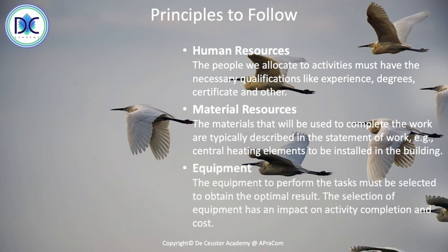The equipment, here we must also select the proper equipment because the equipment will be used to create the deliverables. The selection of the equipment has an effect on completion and cost. So when we have more sophisticated equipment, we will pay more. There may also be an effect that the work may be done faster. So we have to understand what equipment we're using.